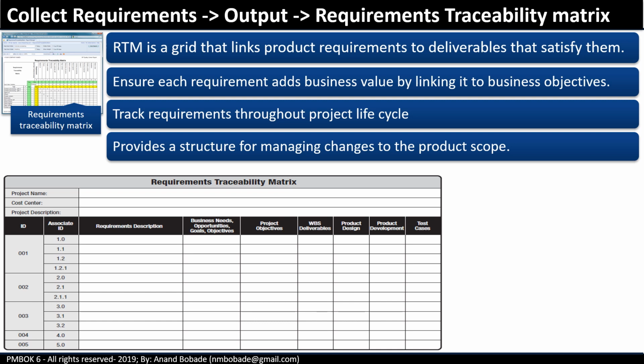Imagine one of the stakeholders comes to you asking for some modification to a requirement. Then you refer to the RTM and find out that this is the same stakeholder who had given this requirement earlier. Definitely, you will have more power and more reasons to discuss and challenge that stakeholder on whether that change is really required or not.